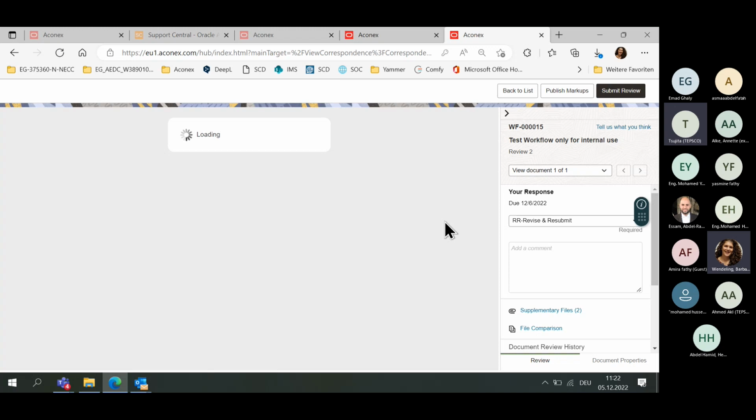This tool should make sure that we do not forget any requirement from the contract regarding a document. For example, when we send a functional design document for the hardware, that we do not forget something which maybe has been decided in the negotiation meetings. It could be that there is some change, and the requirement management handles this.